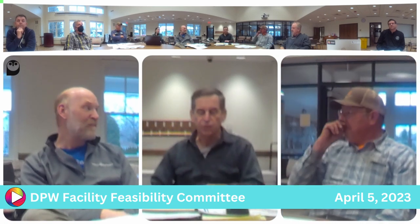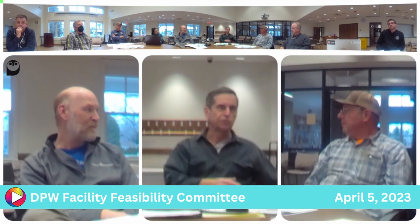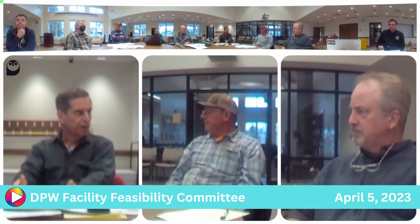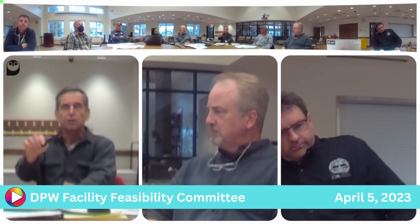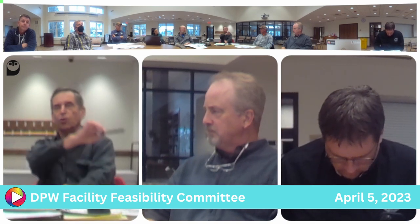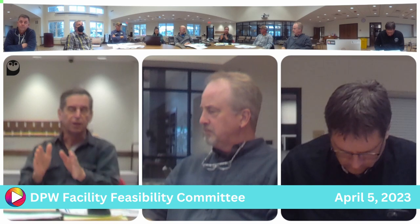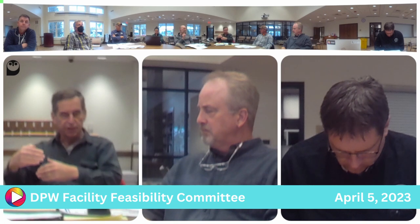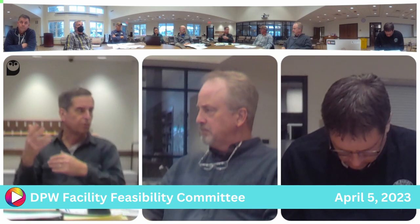Okay. That has a lot to do with it, because when you design something for the public, I'll use the elementary school from 30 years ago, it was the easiest way to compare. You get what you want for your base bid, and you go out to bid for the contractors, and they bid based on prevailing wage and everything else. Then you typically want to make sure you come in under your bid, because if you exceed it, you've got to go all the way back to the beginning and start the process almost all over again. So in many cases, what you do is say: we absolutely need these things, and these things we would really love to have, but if we can't afford them, we can make do. Those are called add alternates.